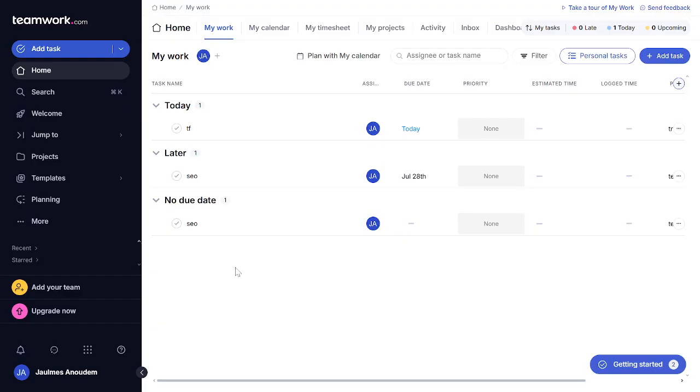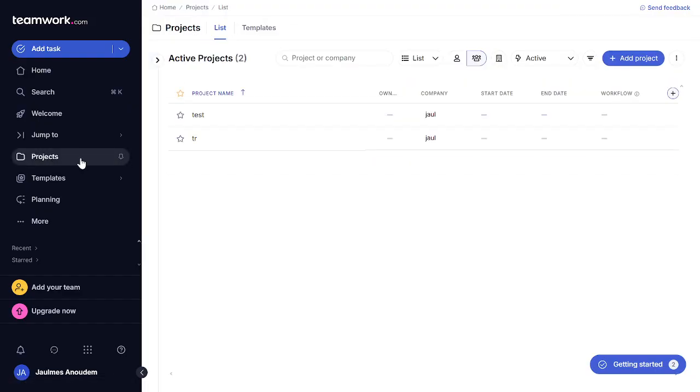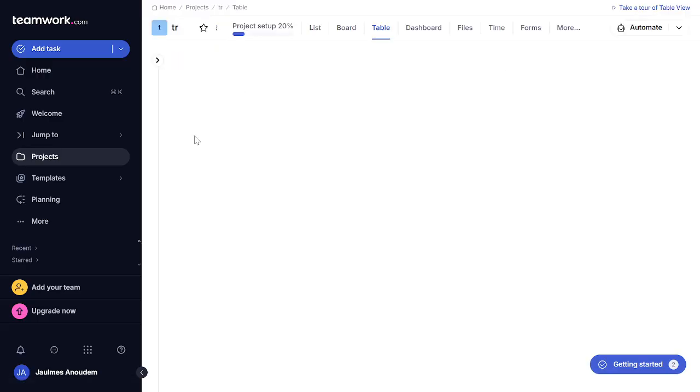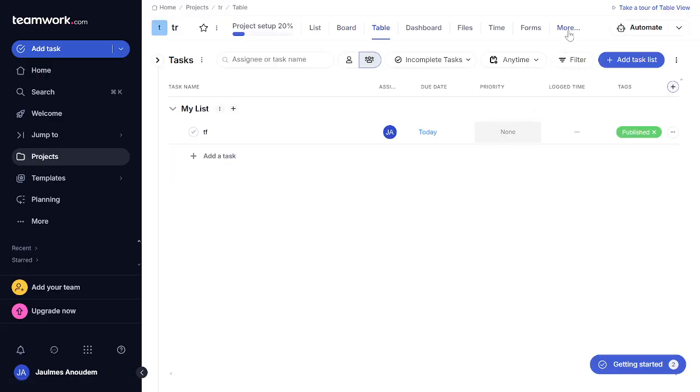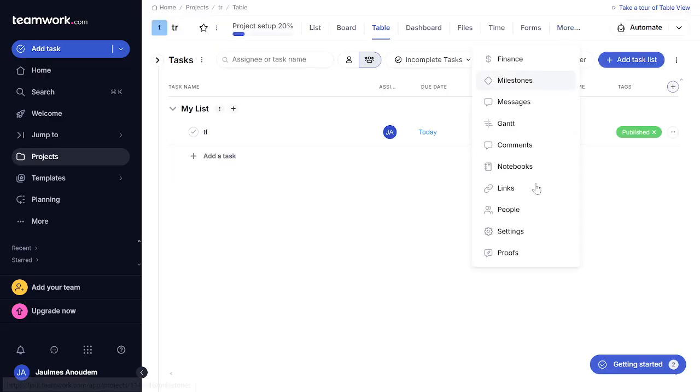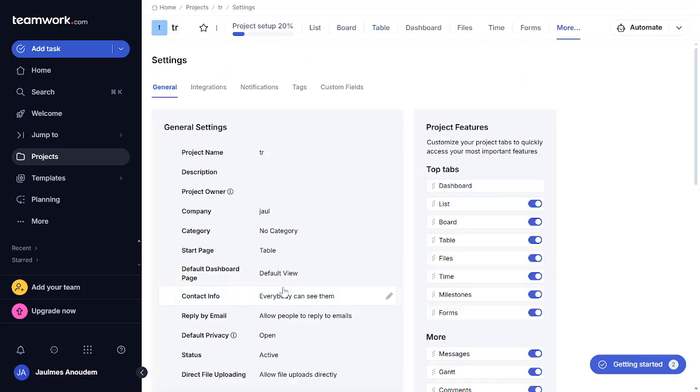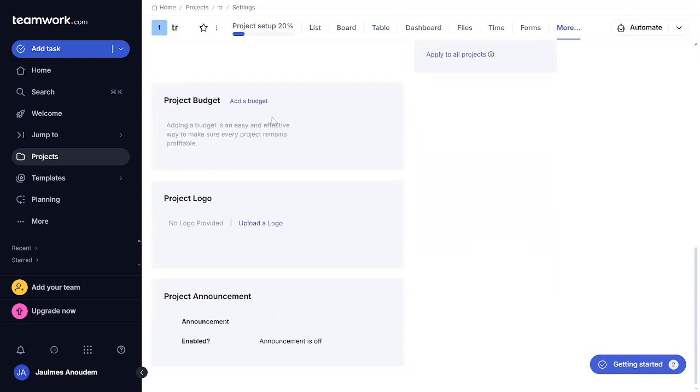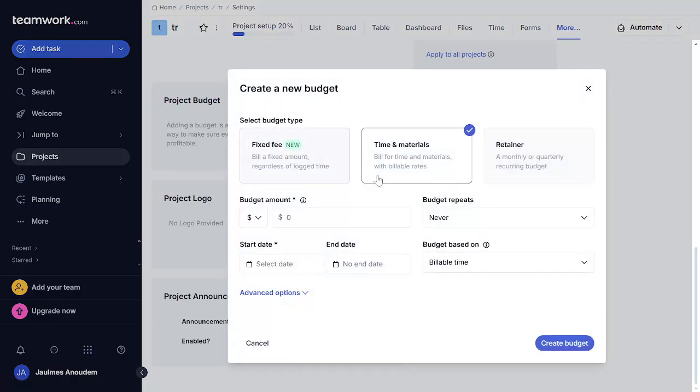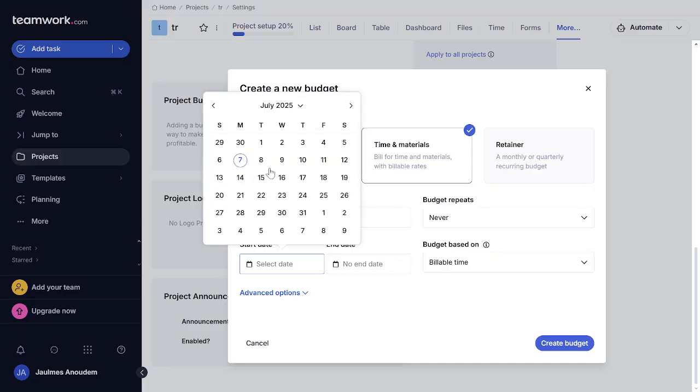First up, we need to set up a project budget. Navigate to the Projects module, select your project, and then click on Settings. From there, select Budget and enter your planned budget. This is the financial blueprint for your project, and it's crucial to establish it before moving forward. It gives you a benchmark to measure your actual spending against, helping you to identify any potential overruns.